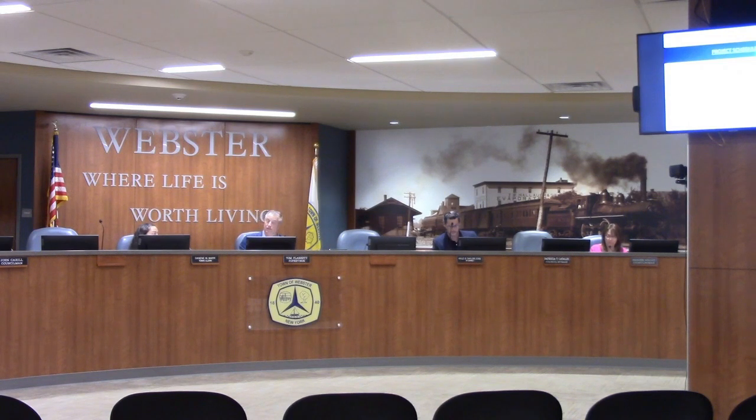And no one said, geez, that's a change order that's going to be over $50,000, which needs board approval. Because it's still a municipal bonded project. It's a hybrid bond of 10 years, where we can stand on a mountaintop, as Barclay Damon and their attorneys for Coke Fairlight negotiated and constructed this with our attorneys, both Charlie Genesi at the time, but our outsourced attorney, Jeff Storch from Harris Beach. Because we need to be above reproach and say, hey, we are not ingratiating a private company on public infrastructure. In this 10-year bond, you can stand on a mountaintop and say to the world, yeah, this is a municipal project. They're paying 96% of it. All by the book.